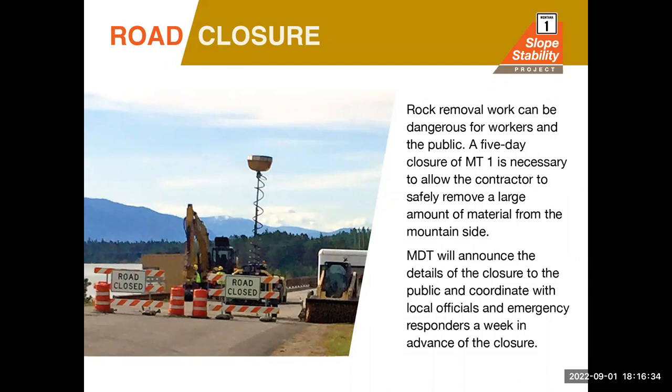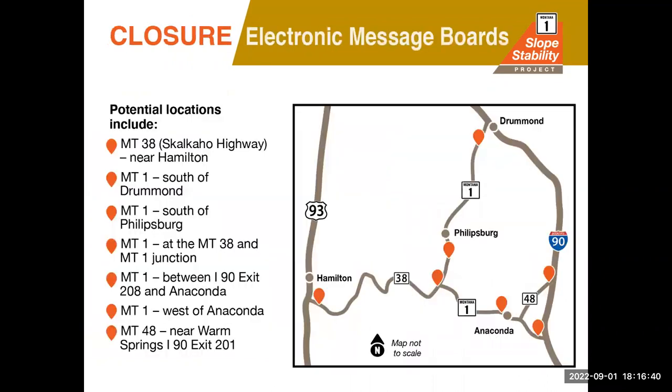There's several ways that we're planning on providing notifications, especially about the closures, and some of those are mailers. I think some of you attending this meeting probably received those mailers, the meeting notifications. We'll reach out to the news media with news releases. We have radio advertisements planned, and social media Facebook posts that we'll put out through MDT's Facebook page and boost those advertisements. And then we have email and text message updates and updates to the project website.